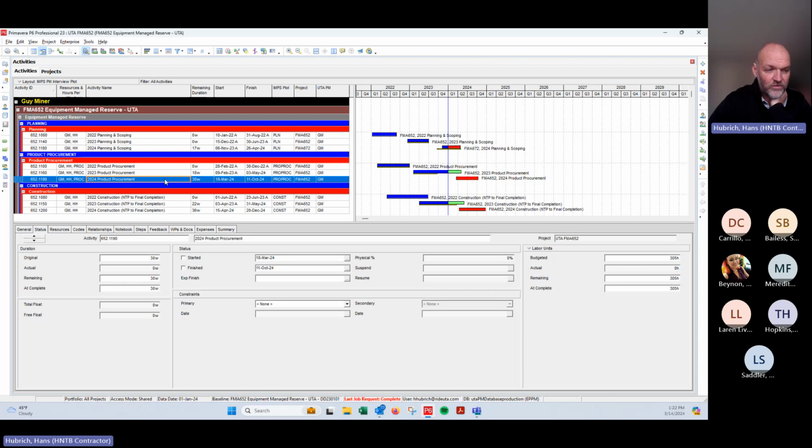But if I was only updating quarterly and I had 27 activities in here for the 27 different purchase orders that we need to get pushed through procurement, it just isn't a functional and helpful amount of activities to be showing, because I'm not updating them and we're not looking at them in real time enough to actually be valuable to helping the project be a success. Okay, yeah, because that's what I'm trying to find value in it for Landon for using this. Yeah, that's what's proving a little bit difficult.